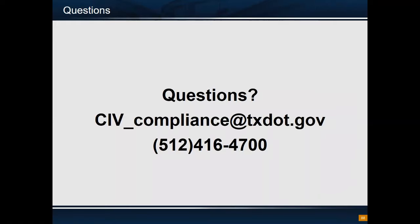The next question: Can the goal be reviewed or changed? The goal can be reviewed and changed only during the negotiation between the LG and the Civil Rights Division. However, once the goal is published, it can no longer be revised or changed. But if during the submission of the commitments the prime did not meet in whole or in part, the assigned goal will remain the same, but the participation will receive an exemption. Once it's published, it cannot be changed.